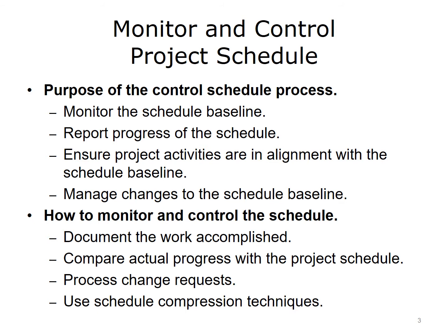Corrective actions may include bringing in more resources, also known as crashing, and doing more work in parallel, which is usually referred to as fast tracking. These techniques may increase project costs and project risks. Preventive actions are recommended changes to the system or process that will prevent future schedule variances. You should issue regular reports to your stakeholders, apprising them of the project status. Your analysis of the project timetable and progress, along with corrective actions, keeps everyone informed and invested in the project.